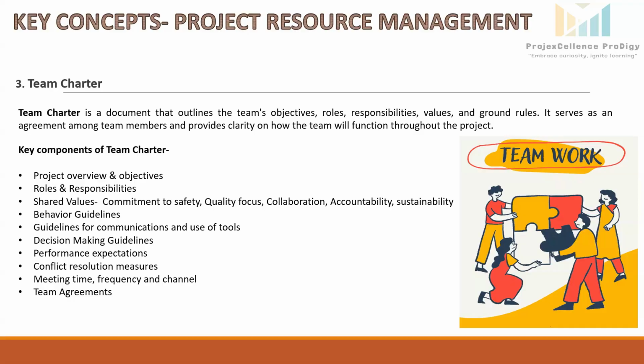solving approach, guidelines for communication and use of tools, daily site meetings to discuss the project progress, weekly status report need to be sent to all stakeholders. In case of emergency communication, what shall be the escalation process?